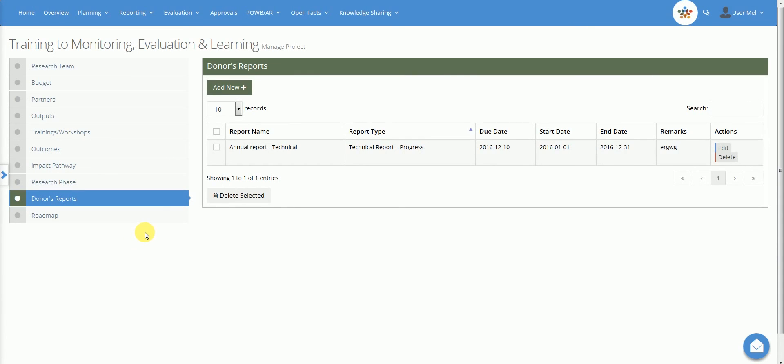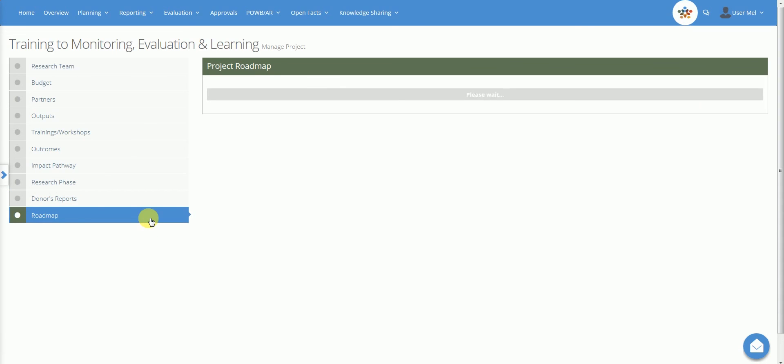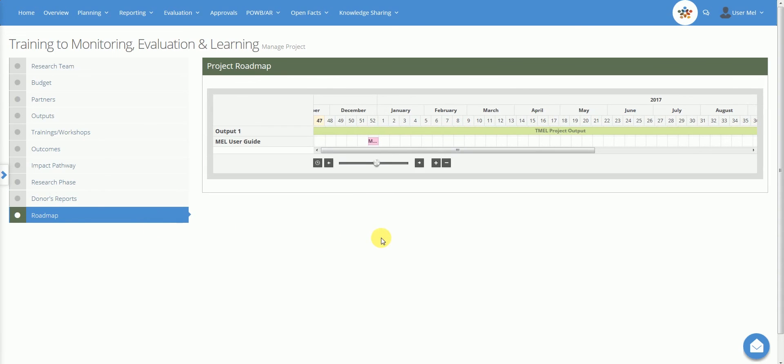The roadmap section provides the user with a roadmap of the project listing all outputs and deliverables presented in a Gantt chart.